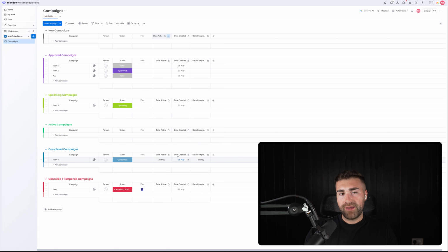Because if you have, and this is an example I gave someone else a couple of days ago, let's say a December marketing campaign, and you don't know the amount of time it takes to go from a new campaign to an active campaign as an average across your entire organization, then you might massively misjudge the amount of time you need preparation wise to be ready, and you end up going live for a December campaign the 3rd week into December and miss a load of, you know, sales opportunities, conversions, engagement, whatever your campaign goal is.